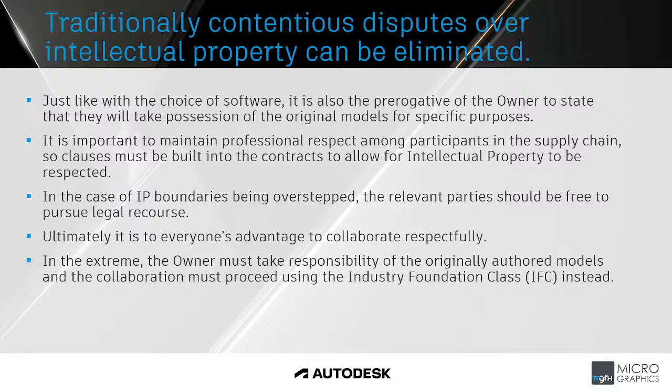Right? And we've discussed that already to say that the owner should look after their own interests first, and that is at least they should have the originally authored models. They've paid for the models. Why shouldn't they get the models? If it isn't stipulated, you stand a chance that whoever the person is that is not prepared to share their file is not going to share their file. And then you are stuck in a situation where you are basically held to ransom to say, if you do any future work on your asset, you will have to contract us because we own the live file.